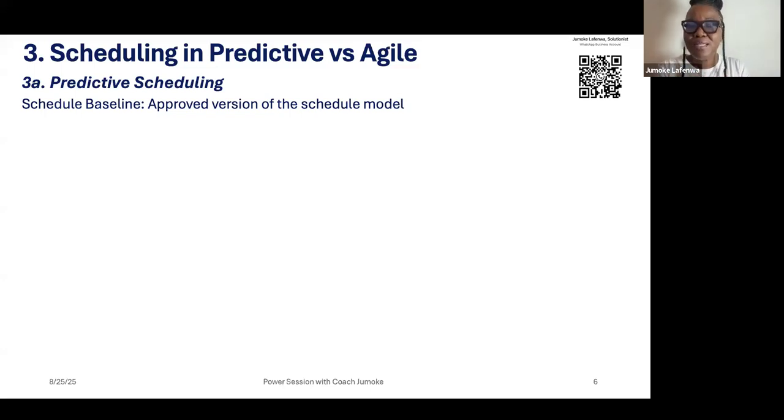So it's not enough that you have a scope. You need to collect requirements, and the requirements you collect end up becoming acceptance criteria. All right, once you are done, your customer or stakeholder or management comes and looks at it, whatever they are looking at, they are trying to tick the acceptance criteria. And once they say, yeah, this was what we asked you to do, that means they have validated the scope. There's a difference between verifying scope and validating scope. That's a topic for another day.